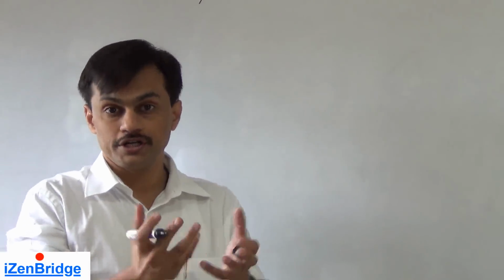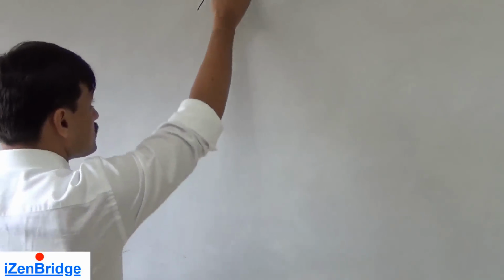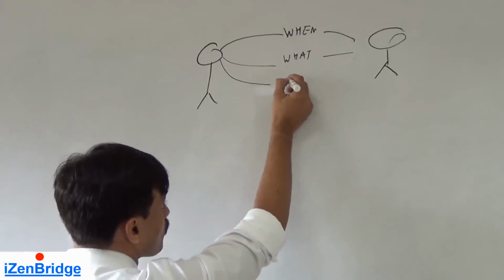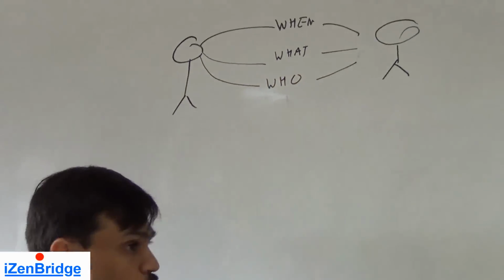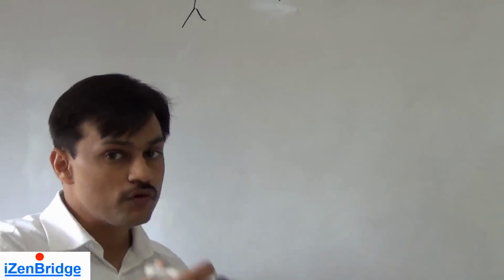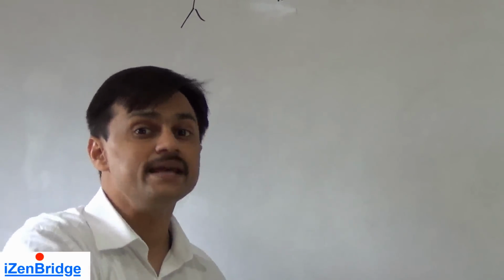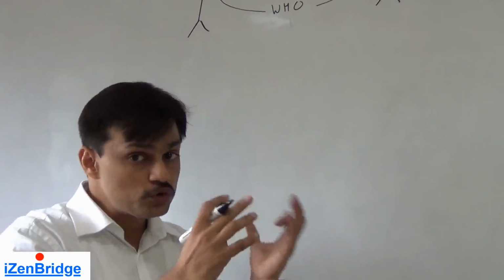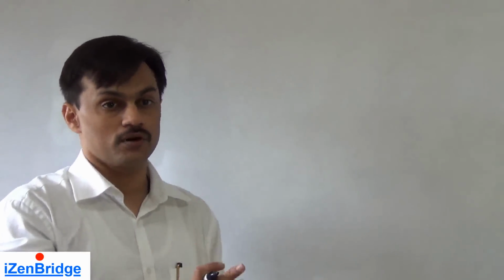That also generates conflict. The third possible dimension of conflict could be "who." Who would work on this particular module? Who will work on this particular area? A few team leaders would be asking for the same resource because they believe this resource is more capable, more smart to execute things efficiently, and that resource usually generates conflict among the teams.